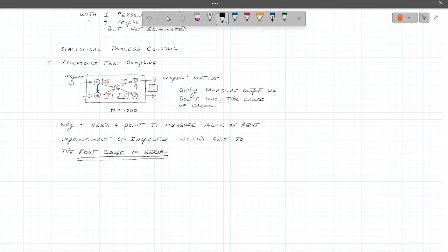Okay. If the truck comes dry, where it's just been rotating and mixing and agitating all the way along the road, and they get there and they add the water, relying on the driver to add the right amount of water. Okay. And that's usually the problem. Too much water and we're SOL. Too little water and we're SOL. Okay. So cool on that?